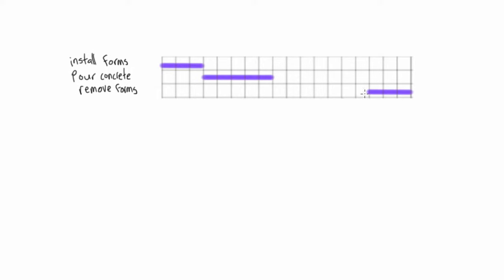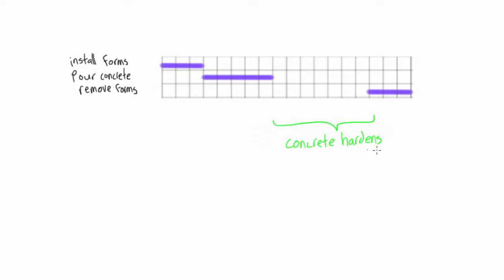So in that case, our Gantt chart for this situation might look something like this. Where we have a gap in the Gantt chart here, in this case there's some amount of duration here, because we installed our forms and then we poured our concrete.